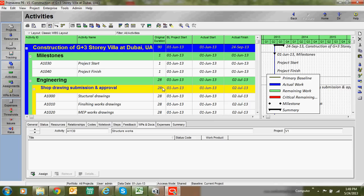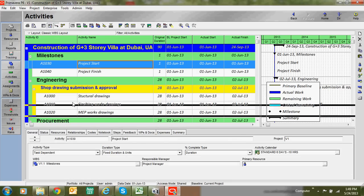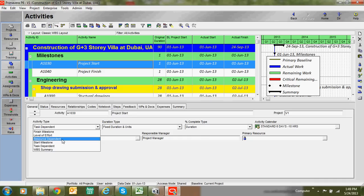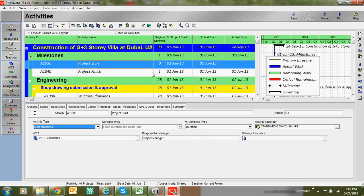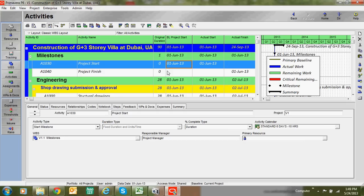Duration is given for engineering, procurement, and construction activities, but not for milestone activities. The reason is that the default activity type is Task Dependent. For milestone activities, the type should be changed to Start Milestone or Finish Milestone. As mentioned earlier, milestone activities have no duration.